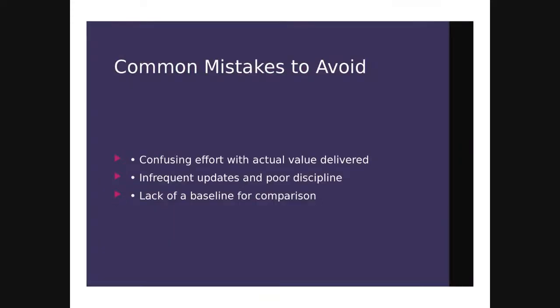Some of the mistakes that you need to avoid as you use earned value: it's confusing effort with actual value delivered. So you could put in 10 hours, doesn't mean that you actually delivered the equivalent of 10 hours of value when you boil it down. So you put in 10 hours to complete 10 things, right? You told management, I'm going to get 10 things done in 10 hours, but you're done with the 10 hours and you only got 4 things done. Now you can see how effort is not the same as value.